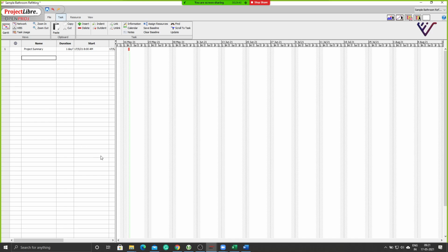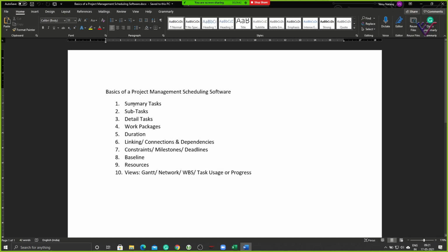Okay, these are helpful. The reason why these 3 definitions are helpful is, in fact, the 4th one as well, work packages. Now, a work package is a combining of different activities in order to create a package. These 4 terminologies will be helpful in order for you to create your work breakdown structure, and they will also be essential when you're doing your billing or costing.